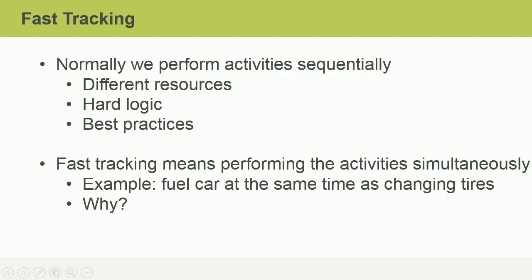When creating our project schedule, we sequence activities based on logical relationships and dependencies. Some dependencies are mandatory, while others are discretionary or best practices. Think about two routine maintenance activities that are common for car owners: refueling and changing tires. These activities are performed independently.